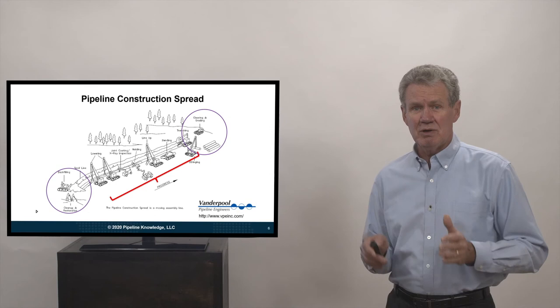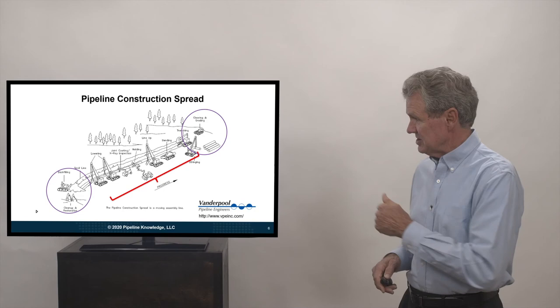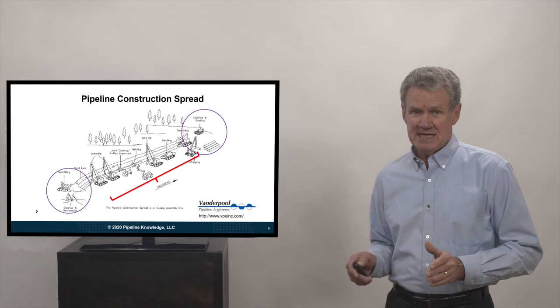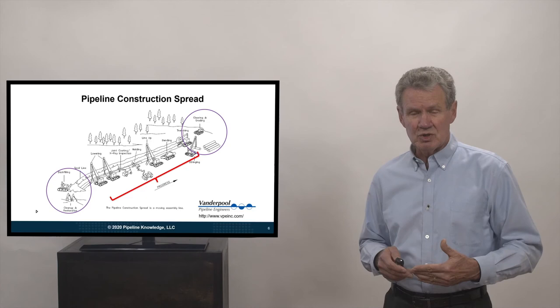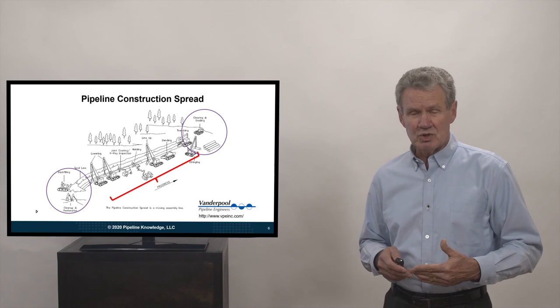When they get to a road, they pick up all their equipment, they go over it and keep on. We don't want to slow them down. And then this clean-up crew and tie-in crew at the back here is coming in and tying together the main pipe that was laid by this middle crew with the road crossings and all of that sort of thing.